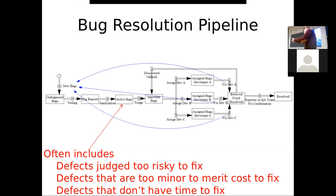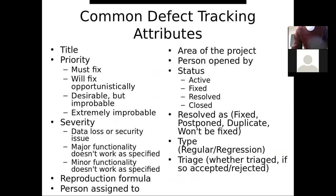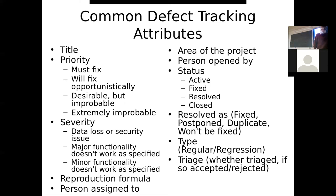You can mark it resolved and eventually completely close it. Just because someone says it's fixed doesn't mean it necessarily is. If the tester finds it isn't fixed, you kick it back — mark it active again and return it to the person it was assigned to. This is a living document. When you close these things, you have a sense of progress and velocity of your project — how quickly you're making progress.